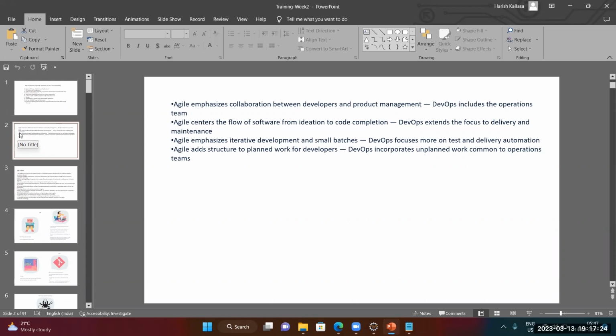So the first step, let's say you have a login screen, and to validate that login screen, you need a service. That service has to be built on Spring Boot. And to validate the login ID and password, you require a database change, right? So you have to divide your stories in that way, to deliver a complete product within a very short time frame.